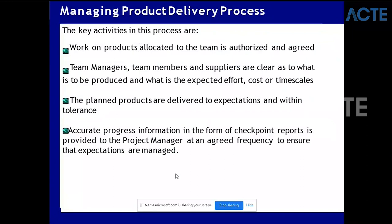What is a checkpoint report? A checkpoint report is if you have agreed to do five activities in one month, you do a check to see if all five activities have been done, within quality. What happens if there's an issue and a team is unable to complete a work item? They should raise it in the risk register - they are not able to do this because there is a risk involved, and they will all sit together and try to mitigate the risk. If the risk turns into an issue, they need to agree what needs to be done - perhaps descope it, put it into the next project, find a solution, or get a third party involved.